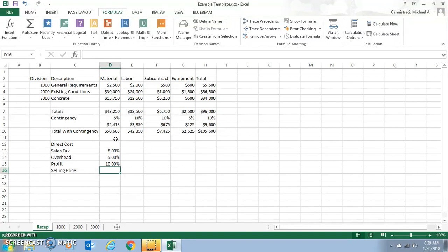If it's a massive job, yeah, and most jobs you laugh yourself silly if you get close to 10%. But it's a number to put in here so that you have a guideline and you can adjust that according to the project size. Same thing with the overhead. It really depends on the project. If it's a job where they're requiring P6 scheduling and BIM coordination and things like that, you're going to have extra engineers working on it. You're going to have a scheduler. You're going to have maybe a P6 consultant if you're a small enough company where you don't have anyone proficient in it. Same thing with the BIM. And the software licenses you'll tie to the project.